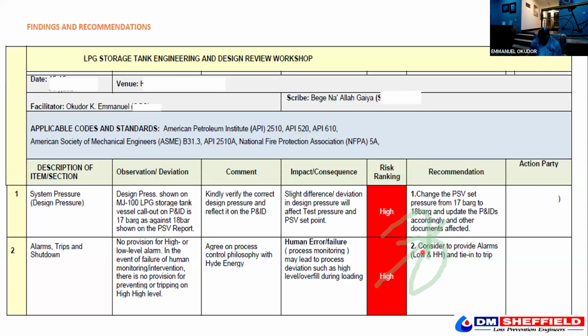How big is this plant? How much am I going to benefit in terms of cost, revenue generated, profit? If I do all this, if they weigh it and they say, okay, sorry, we need to operate manually for us to make profit, that's fine. There is no code or standard that says you must automate, that is mandatory. And that is why we are using robot shot panel as semi-automated on plants.